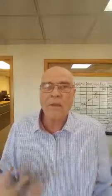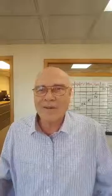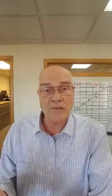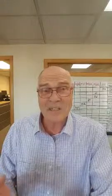So we're at the point now, almost 60 days. We're not quite at 60 days. Yesterday, all the painting had been done, and here's what happened in one day. The carpet layers were in laying carpet, and all the appliances were delivered. All the hardwood floors are done. All the painting is done. We had all the outlets and switch plates and all that being installed yesterday. We had doors being installed. As soon as the carpet guys left, we had all the doors up.